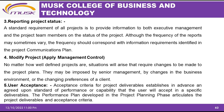The fifth step is user acceptance. Acceptance criteria for project deliverables establish in advance an agreed-upon standard of performance or capability that the user will accept in a specific deliverable. User acceptance is very important. The performance plan developed in the project phase articulates the project deliverables and acceptance criteria. This brings us to the end of our topic on implementation.